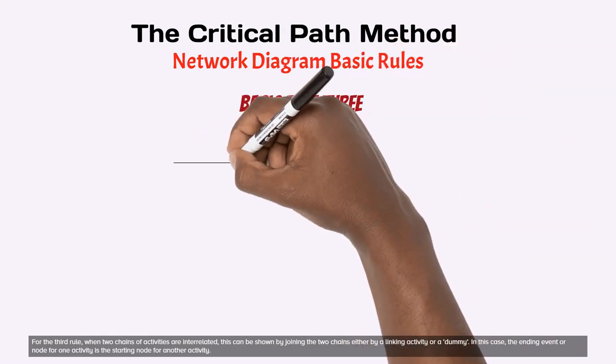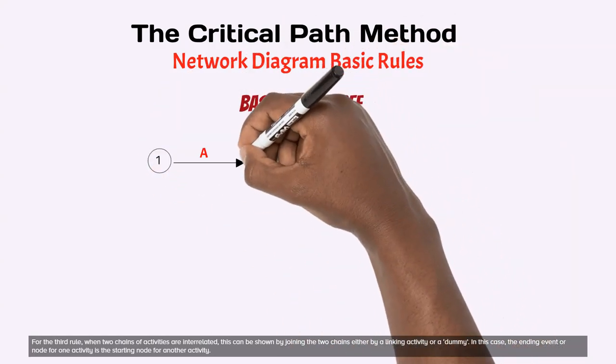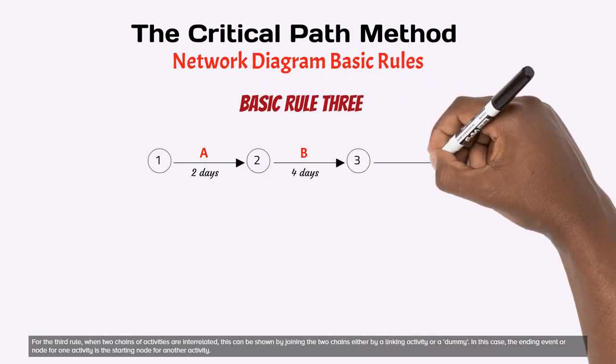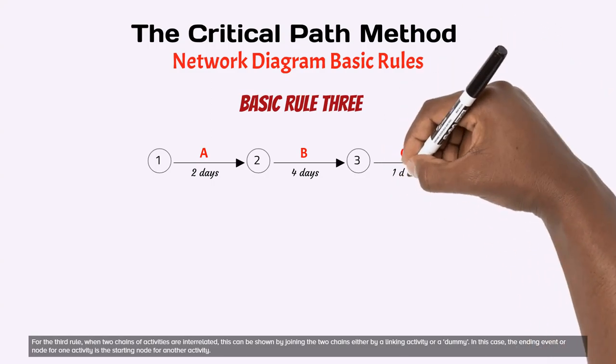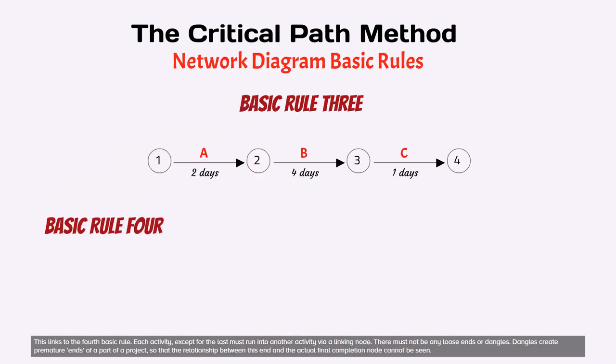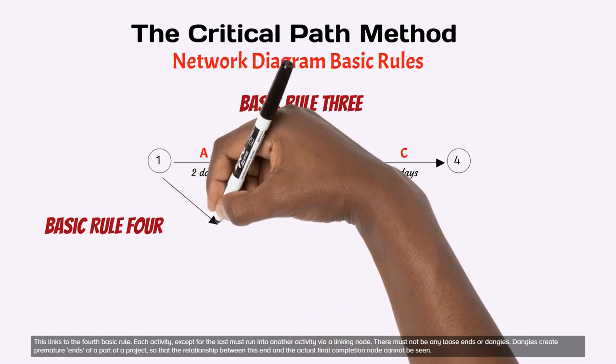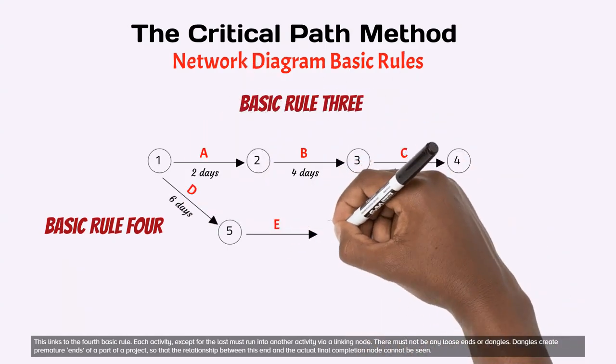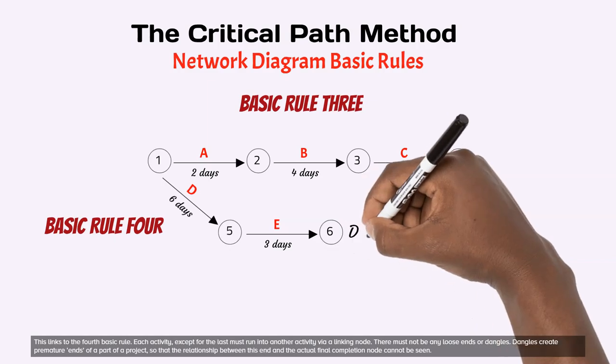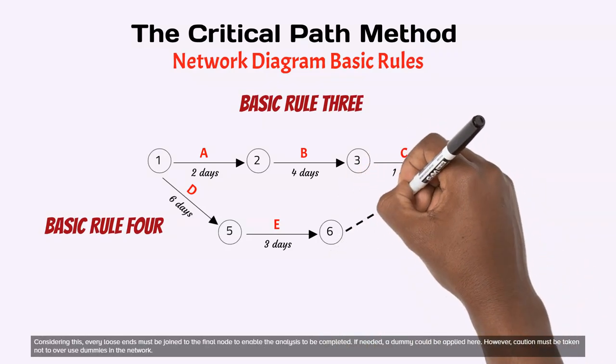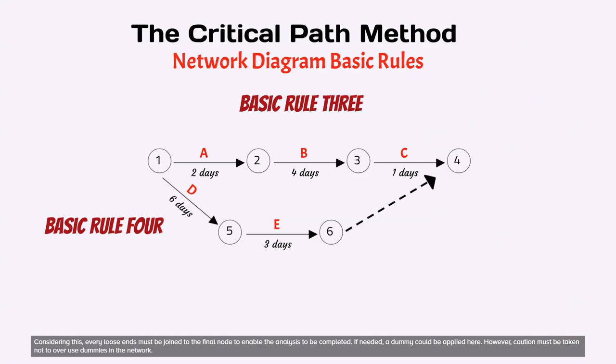For the third rule, when two chains of activities are interrelated, this can be shown by joining the two chains either by a linking activity or a dummy. In this case, the ending event or node for one activity is the starting node for another activity. This links to the fourth basic rule. Each activity, except for the last, must run into another activity via a linking node. There must not be any loose ends or dangles. Dangles create premature ends of a part of a project so that the relationship between this end and the actual final completion node cannot be seen. Considering this, every loose end must be joined to the final node to enable the analysis to be completed. If needed, a dummy could be applied here.